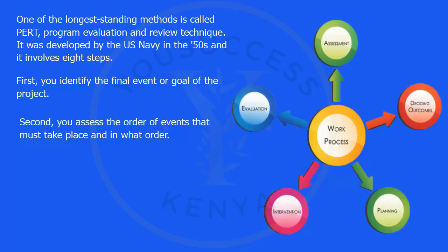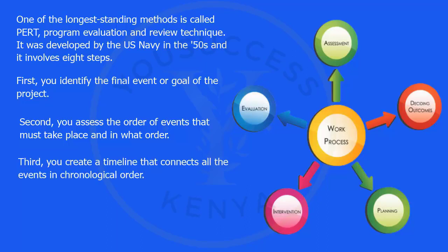You don't want your team to be concerned about chronological order at this time, but you should look at anything that needs to happen for sub-events. For example, if I were opening a new restaurant, I would prioritize hiring people and purchasing cooking equipment. However, I should point out that in order to train personnel, I must first hire them, then produce training materials, and finally, in order to hire them, I must recruit them, and so on.